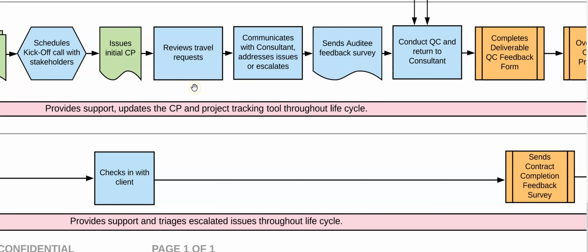and/or auditee. The project manager will also review the resource's time, travel, and expense requests for the project. Any travel requests that involve international or business class tickets must be pre-approved by the project manager. Anything booked outside of this process will not be reimbursed unless the PM approved prior to booking. Whenever the resource isn't sure about a travel expense, they should consult the PM on the matter.